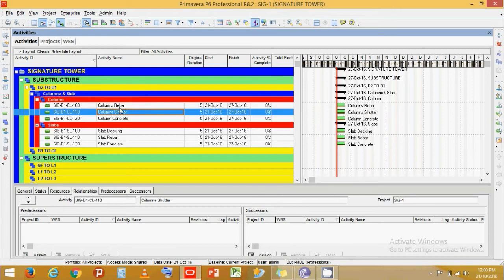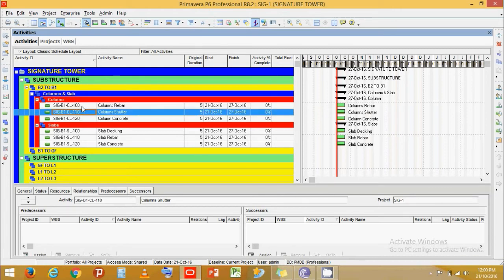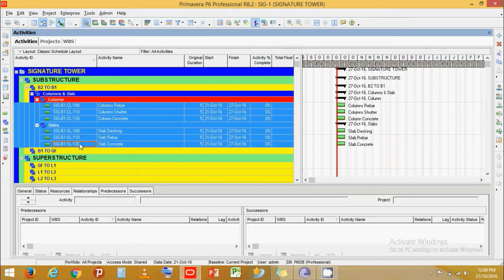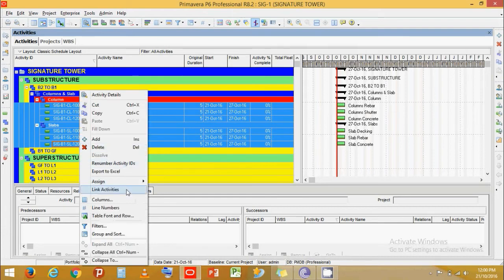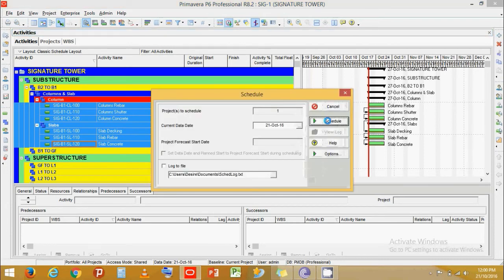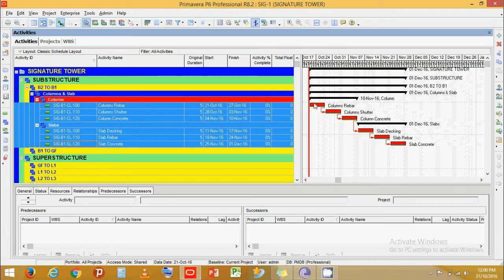For simplicity, let's give all activities a finish-to-start link. Click on the first activity, press Shift, click on the last activity, then right-click and select Link Activities. Now you can see all activities are connected to each other.